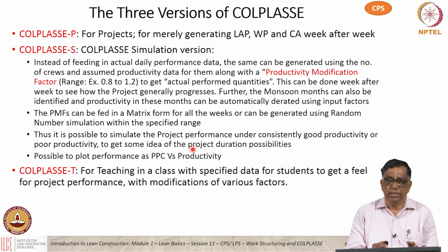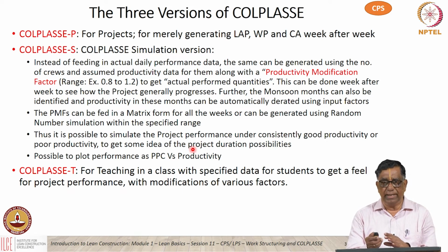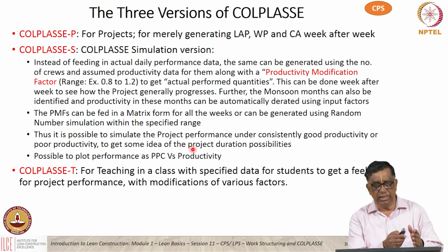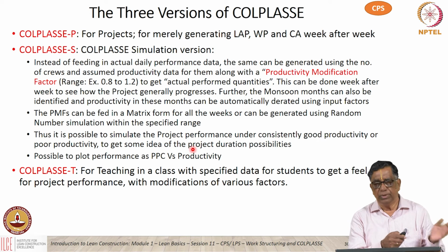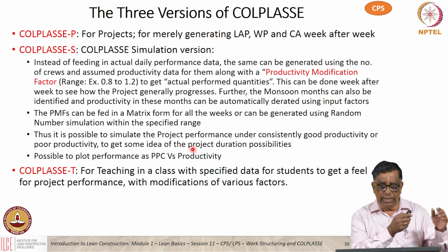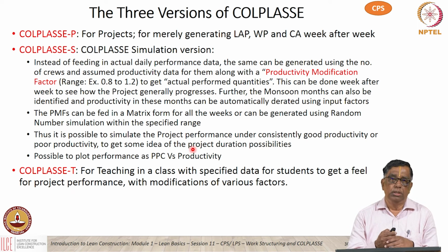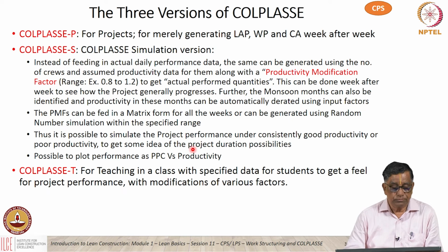The main advantage is the formats are available to you in a standard manner. Once you finish 1 week, the next week's look ahead plan gets automatically transferred from the previous week. The first week, the last week gets deleted, a new week gets added, all the items are transferred. So, the bookkeeping becomes much simpler for these site planners. That is the main advantage of ColdPlus P.